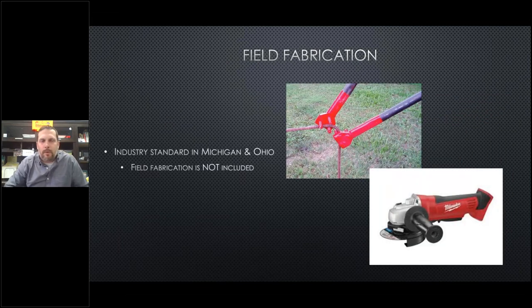And then one thing I wanted to touch on was field fabrication, and just letting everybody know that it's industry standard in Michigan, and Ohio is very specific, that we do not field fabricate reinforcing. We do not bid it that way. If we are field fabricating something, it typically means that something went wrong, whether that's a misfab, a design error, or something just not working right. That would be a pure extra for us. With GFRP,